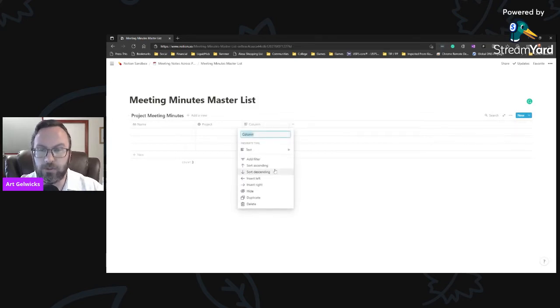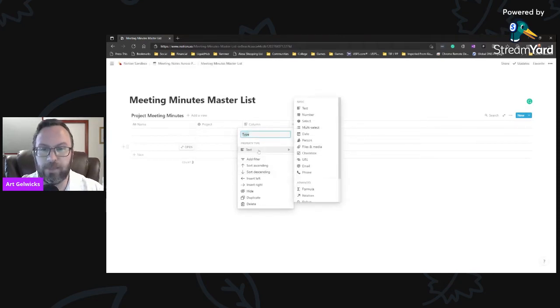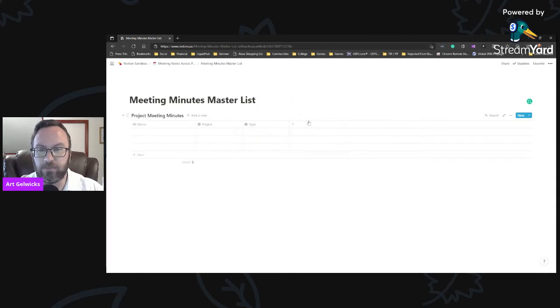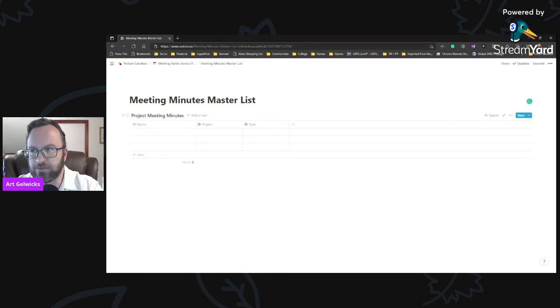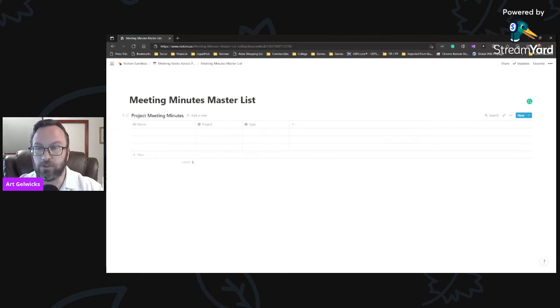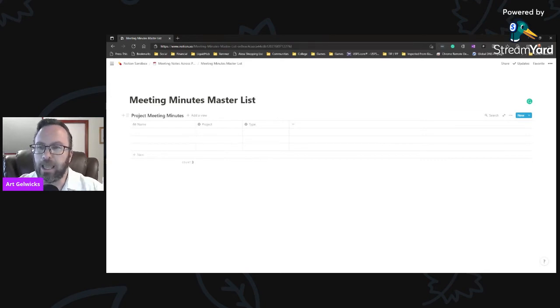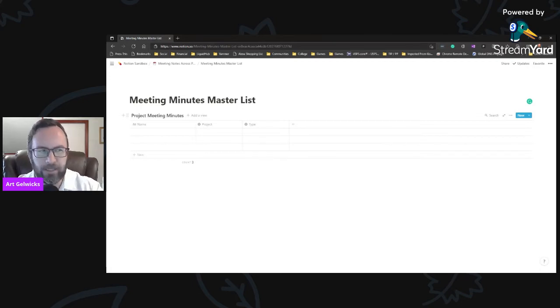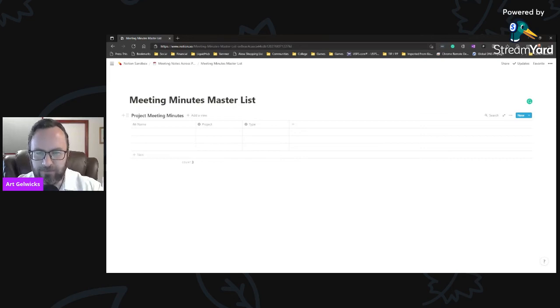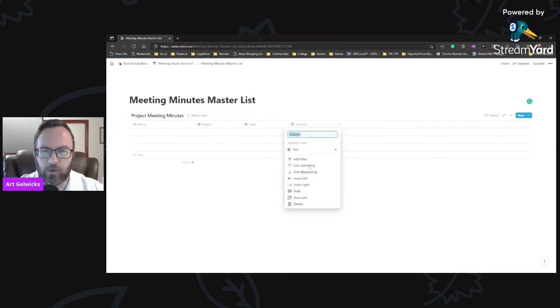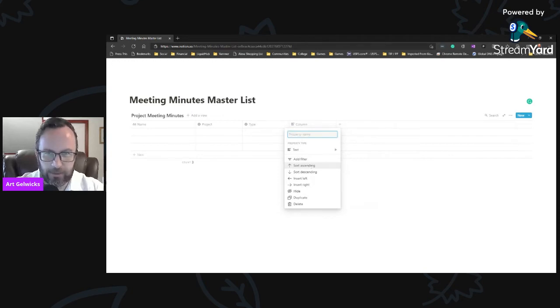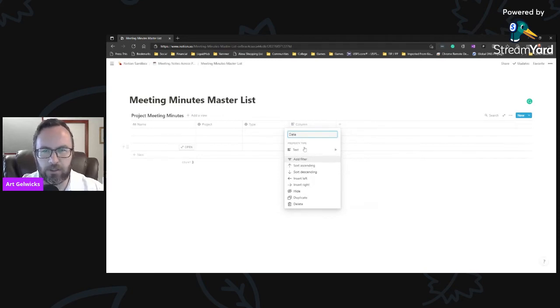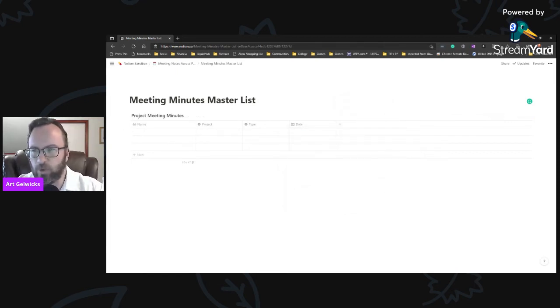Every set of meeting minutes will have a title. I can pick and choose that title as I want. But the first thing I need to know is I need to know what project that set of meeting minutes is related to. So we'll call this project. And I'm going to use a select field for that. That property is going to allow me to designate the project assignments. I'm also going to use one called type. And the reason why I'm going to use one called type is, goes back to my previous statement about wanting to be able to handle more than just meeting minutes. But in this particular case, it's going to be just meeting minutes. So that'll be the only type I put in there. But this is going to give me that future proofing to be able to introduce more types of assets into this master listing.